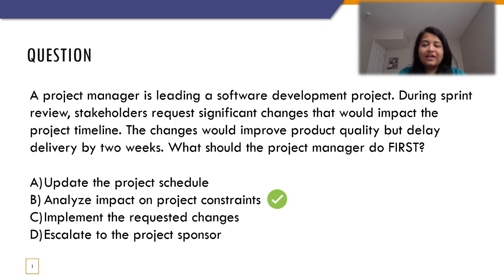We have to remember here that the project manager has certain steps in terms of deciding what to do first as soon as the situation arises. So in that case, if the project manager rushes to the solution first, he would rather fail than succeed in the project. So it's always recommended to understand and analyze what the impacts are in regards to implementing the suggested change, or how we can include this change in the next sprints. So that is a decision that the project manager is supposed to make.